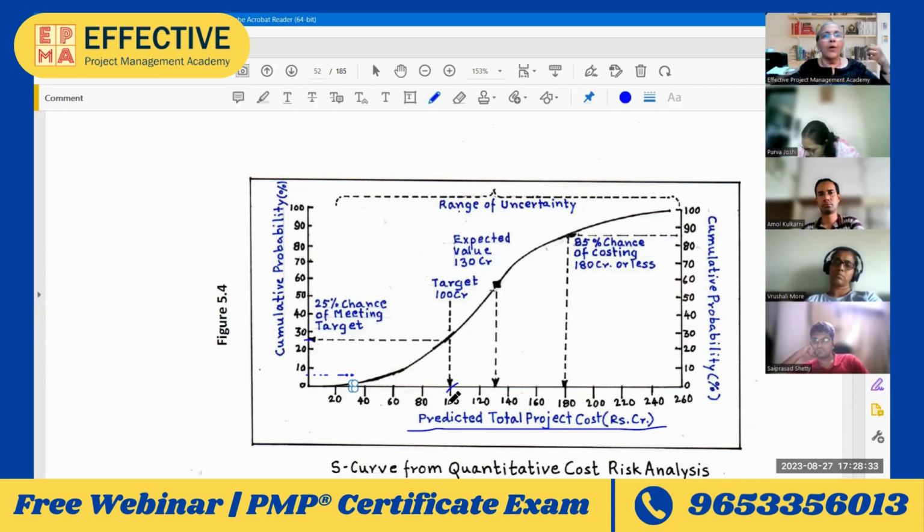We are talking about millions of dollars, then one increment also will mean about $1 million, which is a really big impact. So that's why it's a good idea not to do it manually, which will be error prone. Use some algorithms like Monte Carlo, which will give you the details at very fine slices. Same way you can think about schedule also.